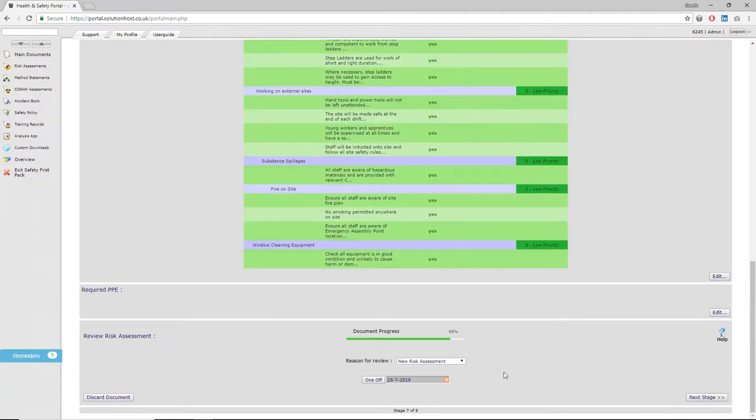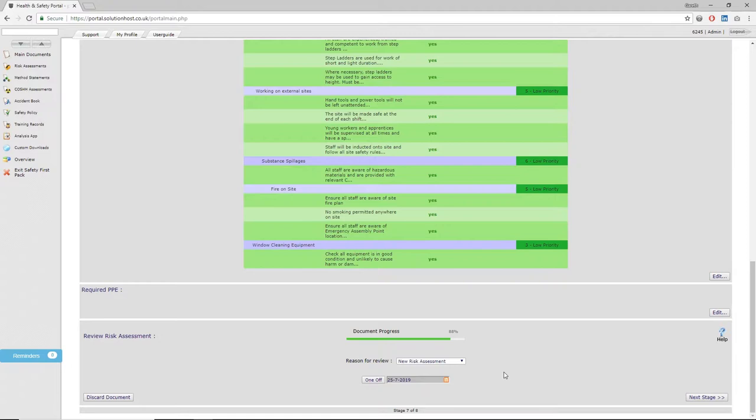The last stage of the risk assessment gives you one last opportunity to scroll through the document and ensure that everything you want is in there. It also allows you to set a date for review. This may be in line with an accident you've had regarding that particular task, or it may just be a routine review. The system will automatically remind you when that date comes up.